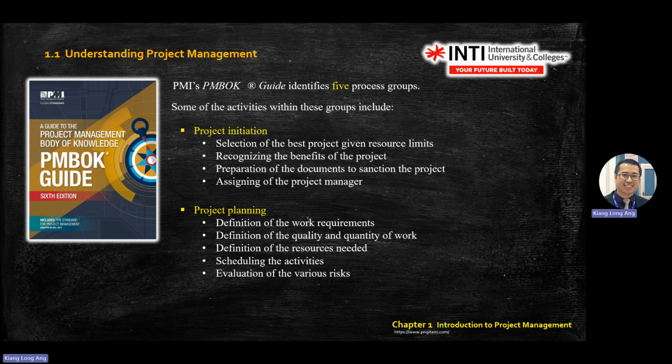So these are the 4 important decisions that you or the higher authority need to decide. Proceed without alteration or without any changes. Second, proceed with changes. The third one, on hold and wait for more information. Fourth one, cancel.